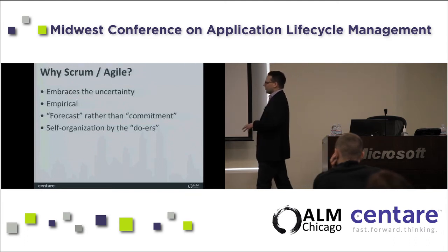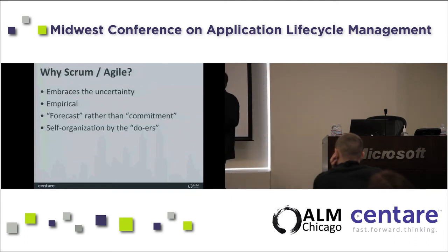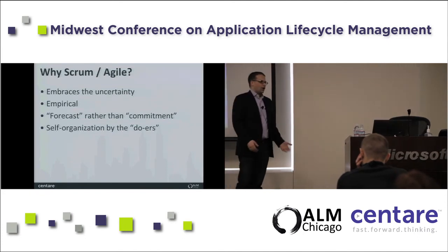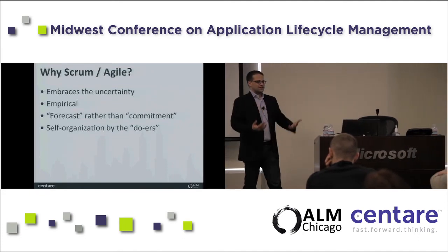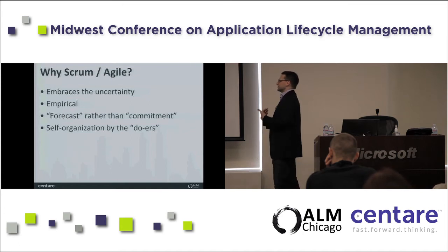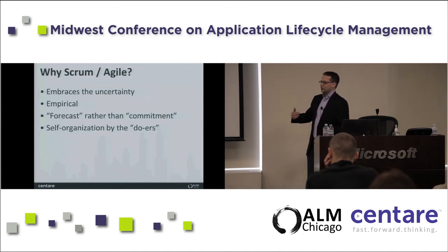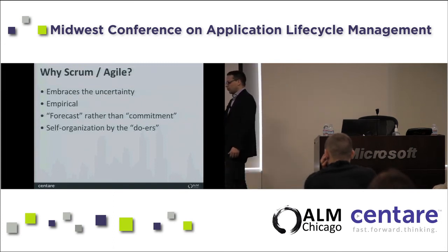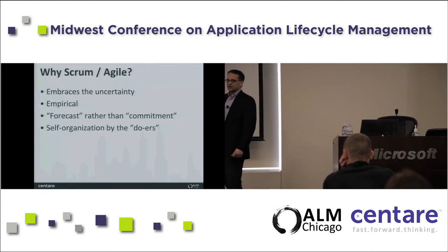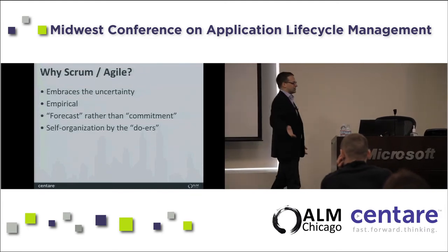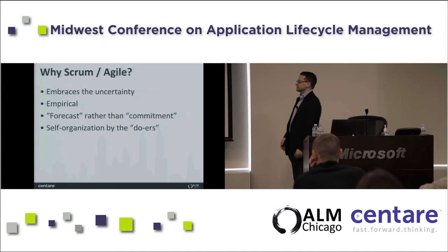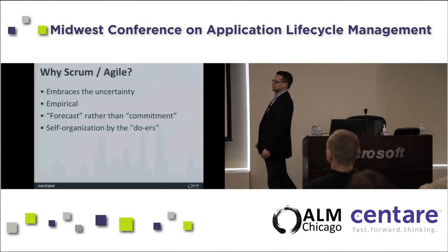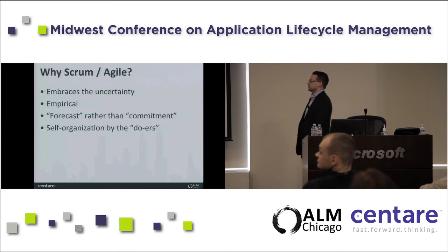We've been saying for a long time in Scrum that the team does sprint planning in order to commit to what they're going to deliver at the end of that sprint. What has recently changed in the Scrum.org community is that we're trying to move towards using the word forecast. We are forecasting, we're predicting, very much like a weatherman predicting what the weather's going to be in 4 days. We're trying to forecast what we're going to deliver, but it is not a guarantee that we're definitely going to do this. So I guess it makes us even more weaselly as Agile people.